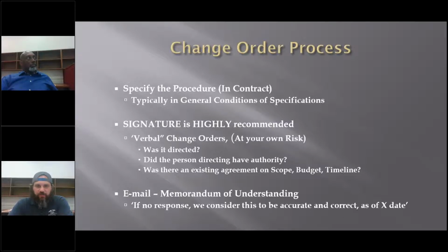You might run into an issue just like I'm in, where I'm not quite sure whether or not we're going to get paid for the additional work, but it's a small enough dollar amount that I'm okay just to incur that cost. It's not always the case. You want to make sure that the change order was directed by somebody that has the authority to do so. And what Sam was talking about, that person has to have the capacity to do so. So you can't have a change order that's been authorized by, this might be an extreme example, a laborer on site or somebody that's not a foreman or that doesn't have the authority to make any financial decisions regarding the project. That can get you into trouble.